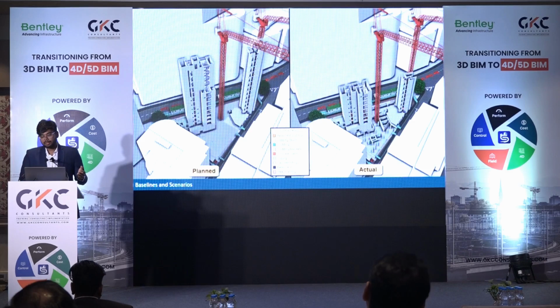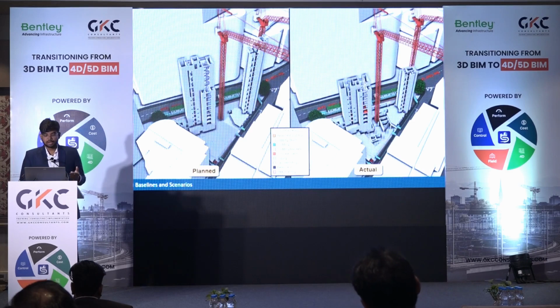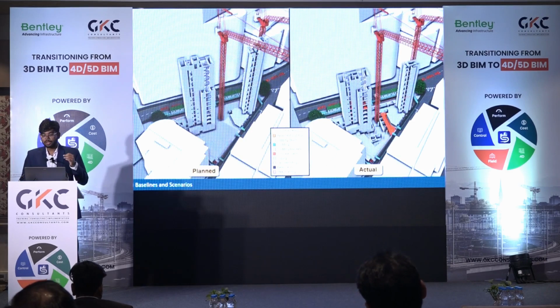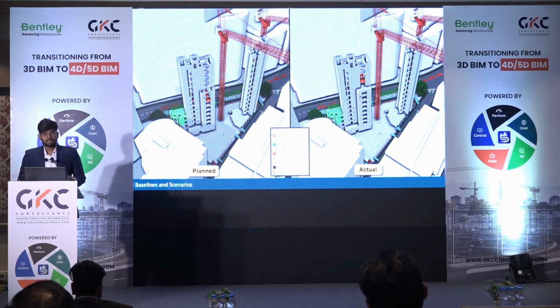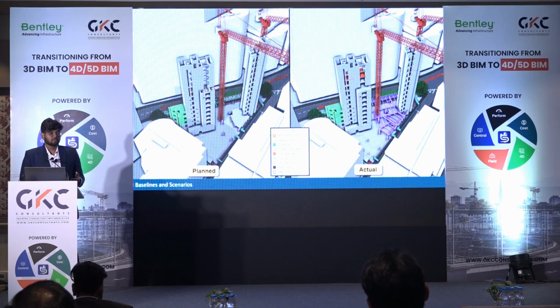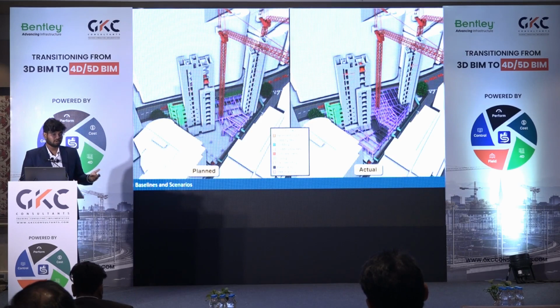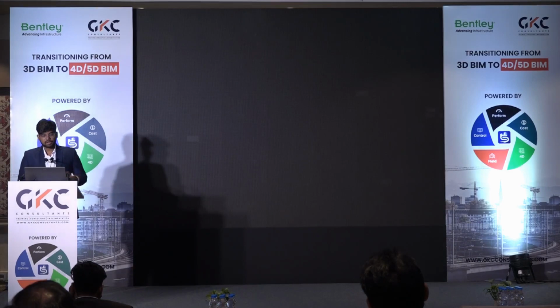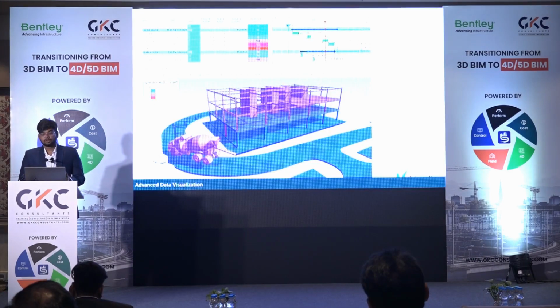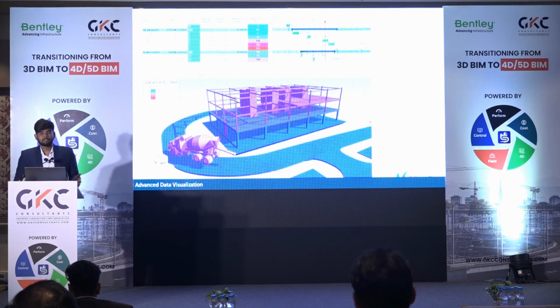But here, at least you get some idea of where you are deviating, and maybe you can question better why there is a delay and when the delay starts. And when we talk about the actuals, we collect data from the site, and we can do further data analysis on it for better decision making. So here, for example, we started accumulating the actuals data from the site, and we start seeing the variance of the start date, and we have created a heat map.